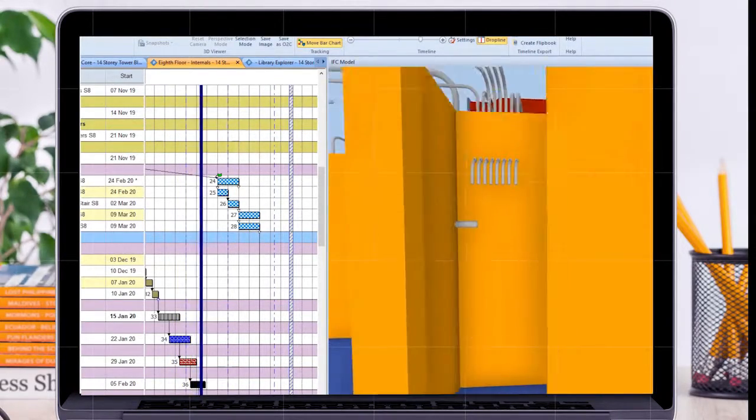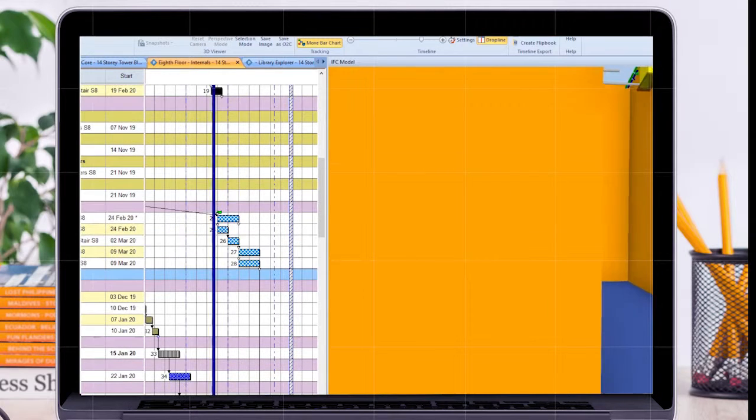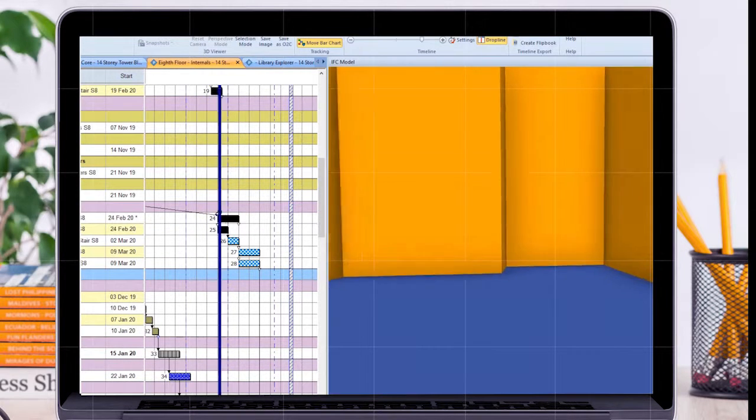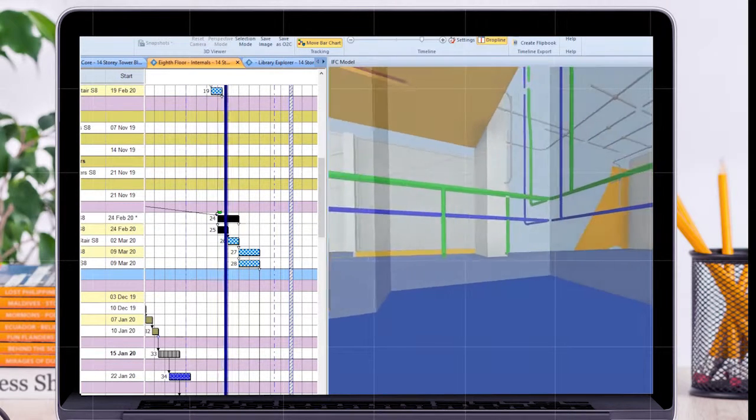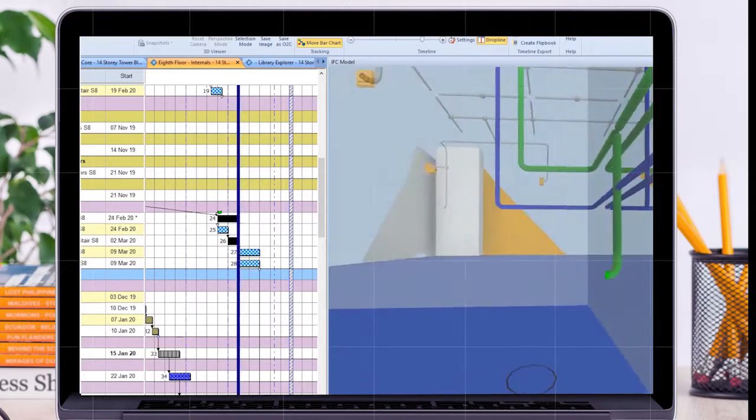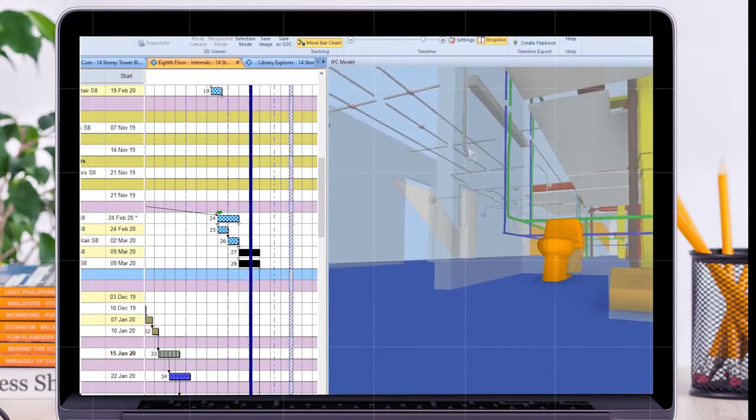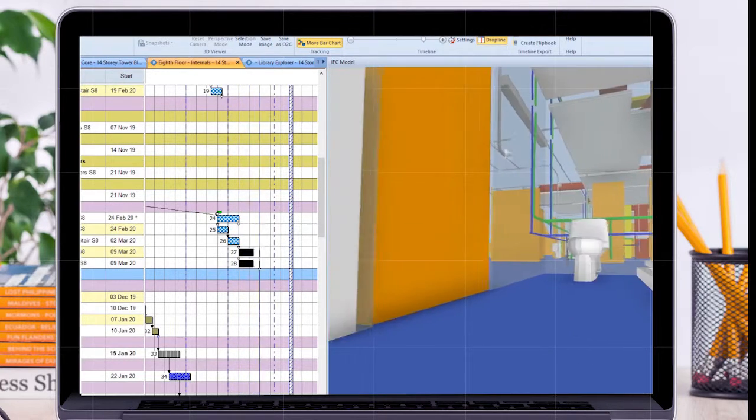You can import 3D models directly into PowerProject BIM and build a basic 4D plan by quickly and easily associating project tasks with elements of the 3D model.